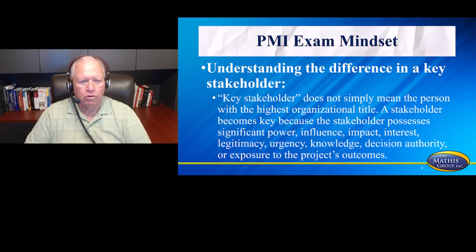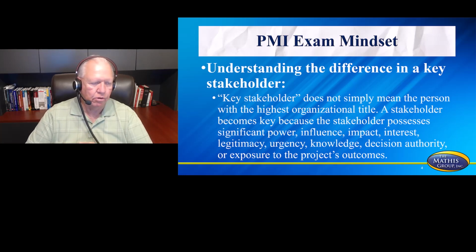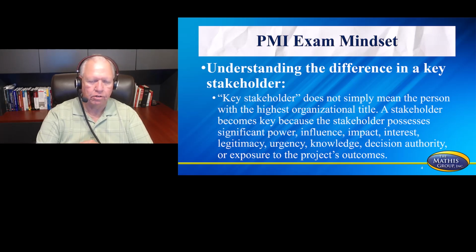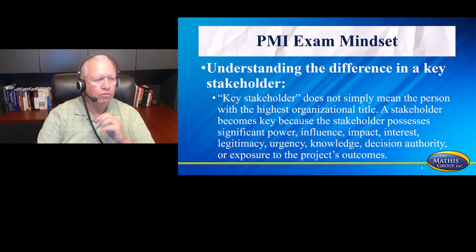The mindset also goes on into understanding the difference in a key stakeholder. Key stakeholder does not simply mean the person with the highest organizational title. A stakeholder becomes key because the stakeholder possesses significant power, influence, impact, interest, legitimacy, urgency, knowledge, decision authority, or exposure to the project outcomes. They are a key stakeholder.